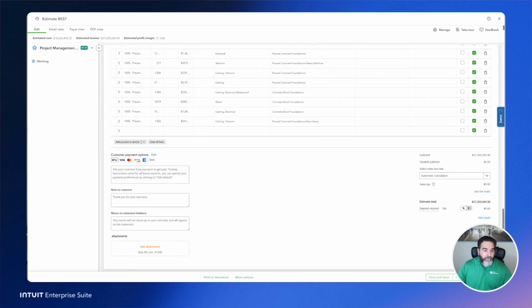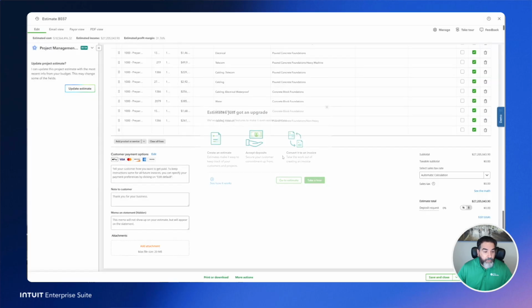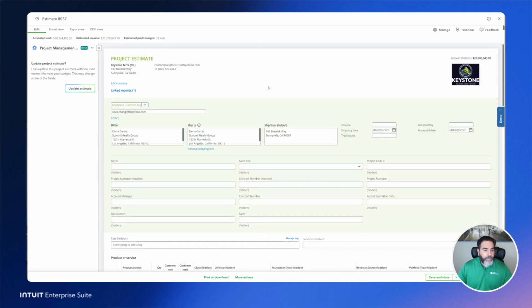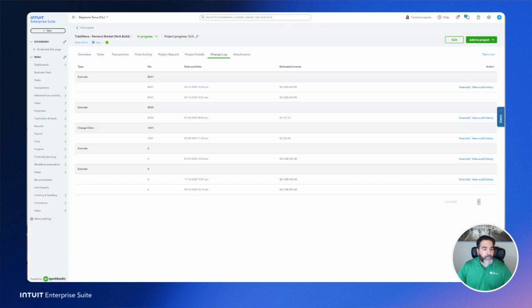And so to avoid, at the end of a job, potential back and forth over what should be that final price that's owed, anytime you have a change order, in addition to having it documented here and date stamped, you could also add an attachment. So pictures, new drawing plans, site plans, whatever the case may be, you can put all those attachments there. And what that does is it really helps you when you get to the end of the job, having minimal back and forths over final amounts due.